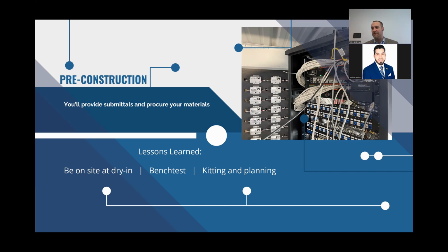And that's because you are absolving yourself of responsibility if the architect's like, I want purple, and you put purple up and the owner goes, what the hell is that purple doing up there? And you go, the architect said purple, I submitted on purple, the architect approved purple, you're getting purple fixtures unless you want to pay me to change those out.